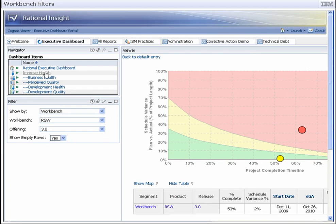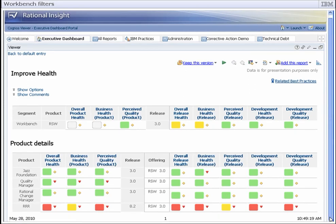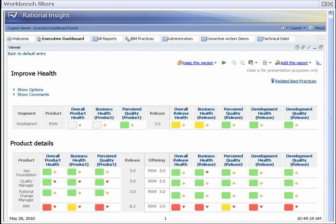The RRR 8.2 release needs corrective action to ensure that the workbench ships on time. Drilling down on RSW workbench's improved health report shows that RRR 8.2 is the only release in the workbench with poor health. The rest of the releases in the workbench are in good health.